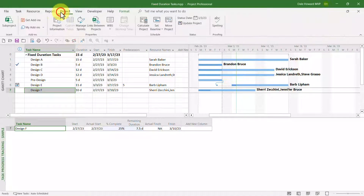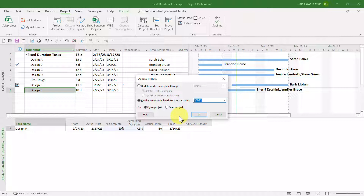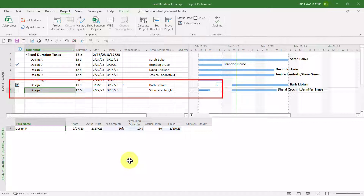To do that, I'll click the Project tab to display the Project ribbon and click the Update Project button. In the Update Project dialog, I'll reschedule uncompleted work to start after March 3rd — that's the status date for the project. I'll choose the Selected Tasks option and click OK. Microsoft Project does not display a warning dialog for this scenario, but notice it changed the duration of this fixed duration task from 10 days to 12.5 days.